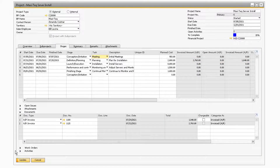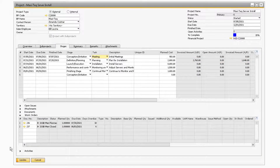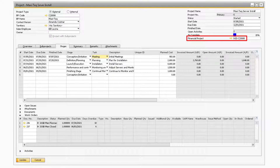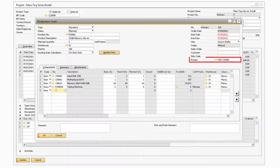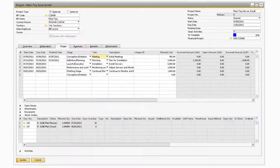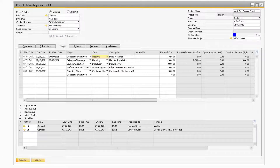The following section is the Work Order section, where you will be able to assign production orders to the Project task. Note, in order to assign the Production Order to the Project, a Financial Project must be selected in the Financial Project field, and on the Production Order itself, the same Financial Project must be selected in the Project field. The last section is the Activities section, which is where you can assign activities to the current selected task.